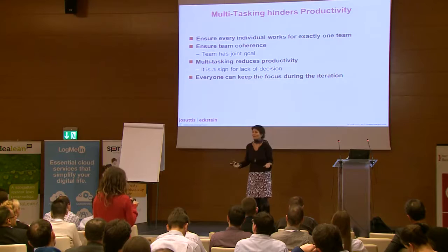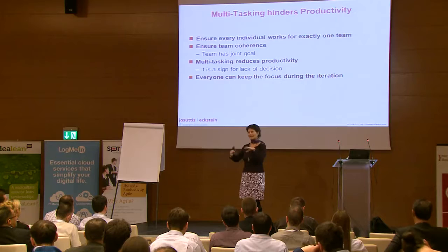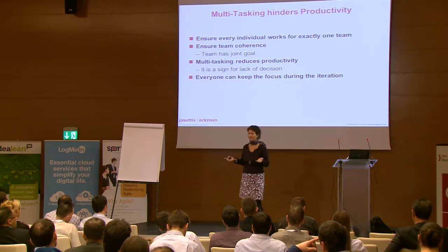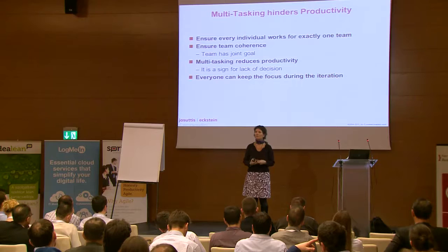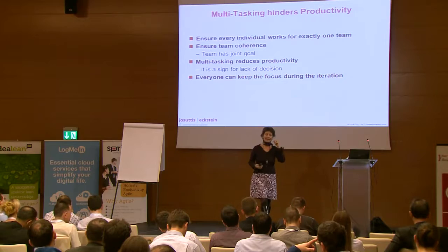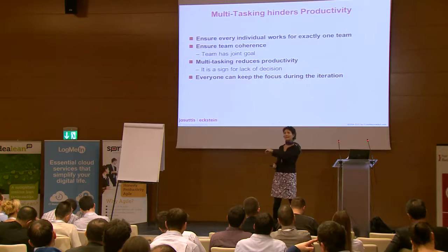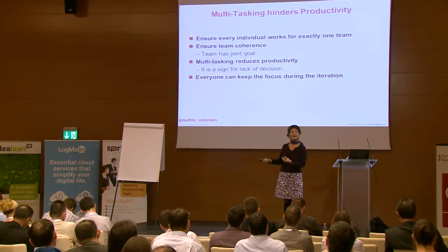So this is often what's happening, and this means that now, still sticking with you, you have to leave what you were thinking about and working on right now and start something new, which is a task switch, and these task switches, according to research, take at least 30% of the productivity away. And I always wonder, are we so productive in those organizations that we can afford this, to waste all that time? And I understand the idea. The idea is that, well, this has a higher priority than the other thing, and maybe we forgot about that at first or whatever. So this is why somebody has to work on that now. But we are losing way more than we are gaining. And this is a big, big problem.